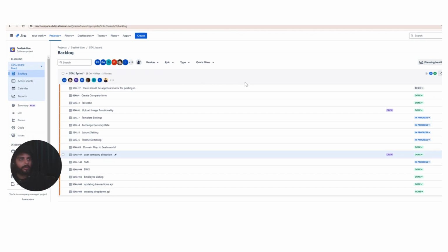Okay, now coming back to the timeline, how do we configure it? Whenever you create a board, whether it's a Scrum board or a Kanban board, if it is company managed, then the timeline would be there by default. And this should be visible above the backlog. You can see that I cannot see the timeline above the backlog because someone might have disabled it via the settings, and by someone, I mean the admin of that specific board.